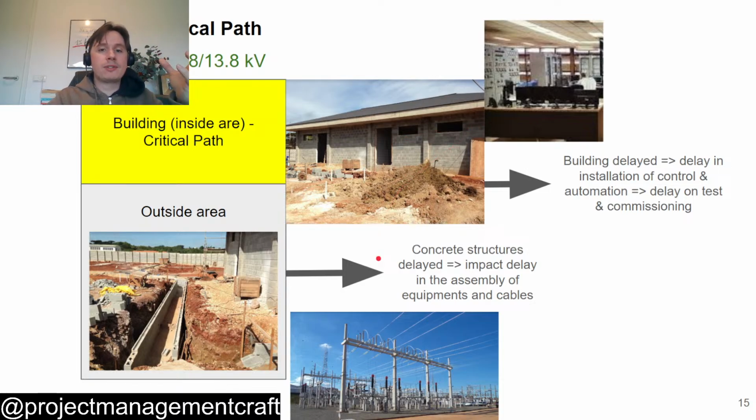Another very important thing: he was trying to justify non-related tasks, but he did not understand the importance of the critical path, because he thought, okay, some delay here, once we get this part done we can try to manage. But he did not understand that by delaying the critical path even a few days, he was creating a big problem for the project, because by the time I took over the project, the delay was already there for, I don't know, weeks.